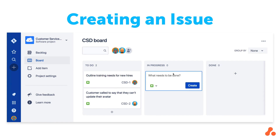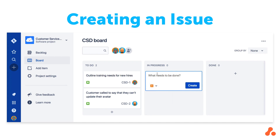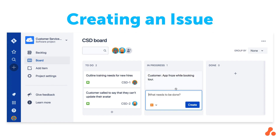Click one of the plus signs in the columns on your board and you have a simple drop-down menu to select the appropriate issue type to represent your work, as well as a space to create the issue summary or title of the issue. Then just click create.